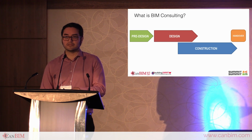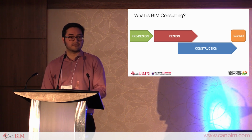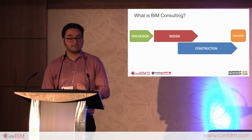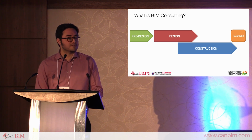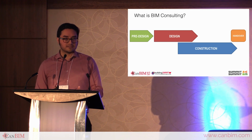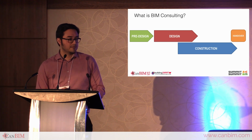Part of this is also developing what we like to refer to as KPIs, key performance indicators, to assess during a project's life that we're actually on track. So you can think about checking things during design and construction, seeing evidence of virtual coordination, managing or having more transparency with regards to change orders and RFIs and site instructions. And substantial completion date, right? It's a good indicator because it is a good target, and we know if we're ahead of schedule or not.